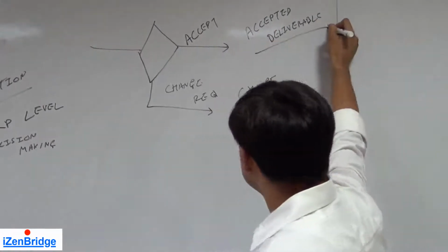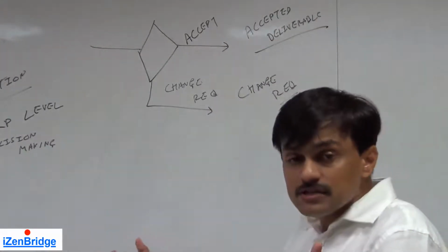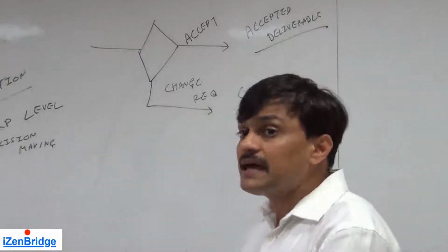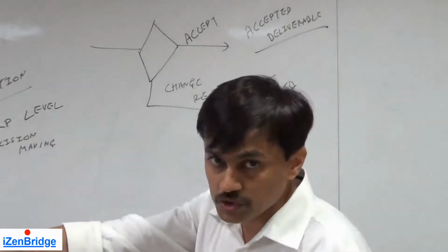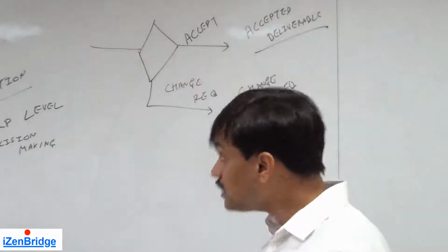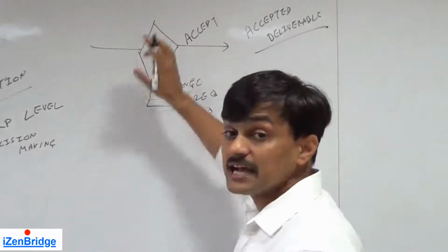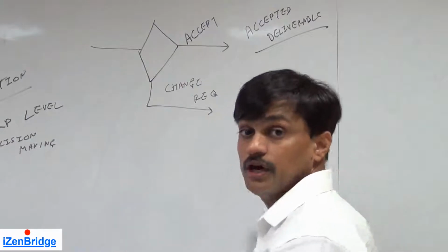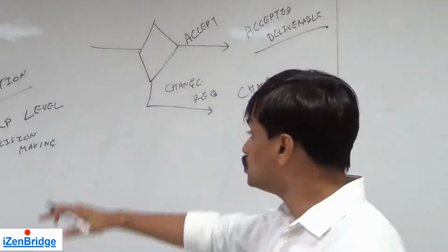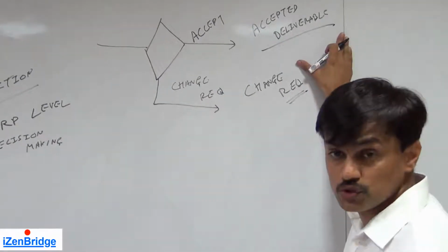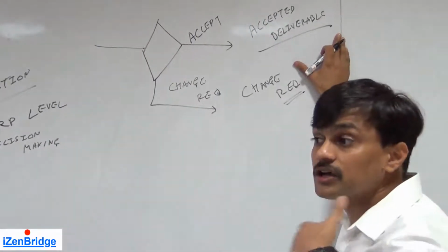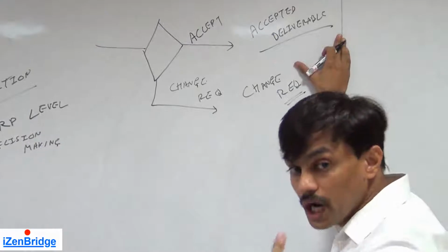Accepted deliverables are the basis for our project closure. So at the end, all the deliverables should be accepted, then only we can move towards project closure. And we should not think that this process will get executed at the end of the project. It is always desired to take progressive acceptance of deliverables, so we have less risk and the communication becomes clear early in the project.